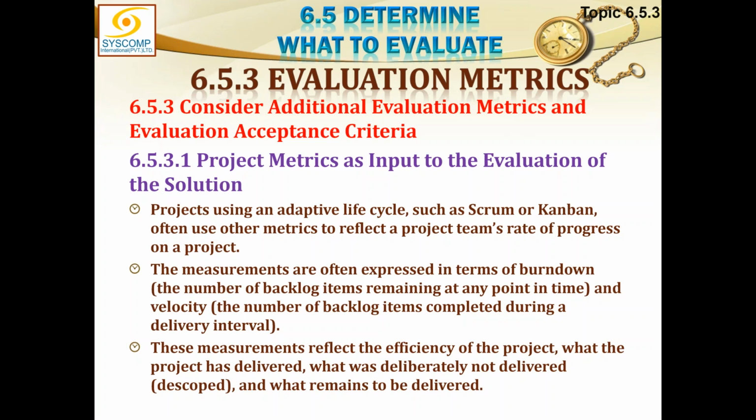Actually, all user stories are not equal in size. Some user stories are slightly difficult to accomplish, some are easy to accomplish. Some user stories are slightly bigger than the others. So what we can do is assign some story points to each user story. One user story could be 5 story points, some user story could be 3 story points, and so different story points could be allocated to different user stories. Now, when this team picked up 10 tasks, they must have calculated the story points. So maybe these 10 tasks which they picked up are worth 26 story points. So they expected their velocity to be 26 story points in one iteration.